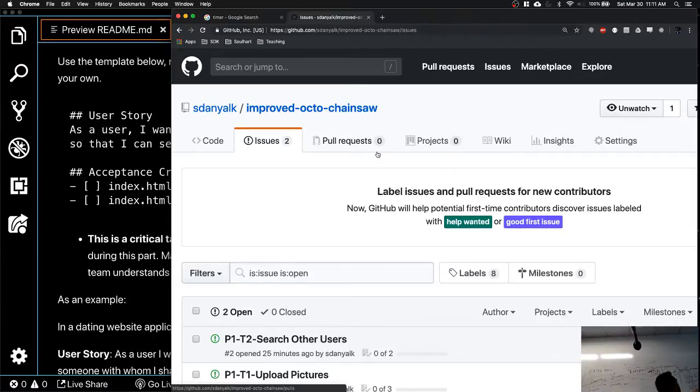So when you have this nicely written down, everybody is clear on it, you won't have 2 people working on the same task. All right? Now, the task, the user stories, I would highly suggest you break it down in such a way that 1 person can work on it, just 1 person. All right? If it just takes an input box to put on the screen, right? Make it a user story and assign it to somebody who can just go and update this code